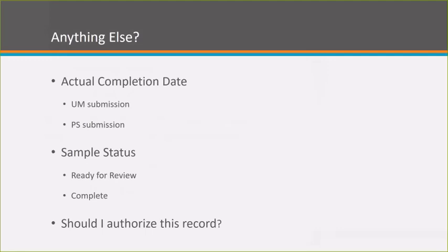There are occasions when authorizing a record is acceptable, and that's really in cases where your material acceptance method is by visual verification. And you could argue that APL is also a condition where a record could be authorized, but since all of the APL materials are recognized materials in Site Manager, it would be highly unusual for you to choose your acceptance method of approved products on a Universal Materials Submission record.